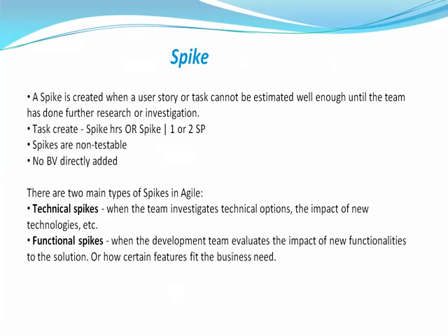See, we saw one example for registration, right? For example, for the registration page, considering payment with PayPal. That is one user story, right? In our previous example. So for that, if the team is feeling that they are not very clear, then they will have a spike story created for the same, and then they will investigate the options available, and they will do some exploration.